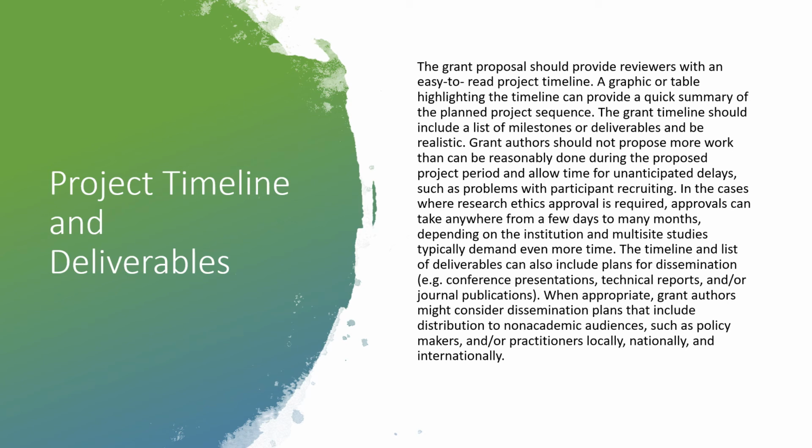Grant authors should not propose more work than can be reasonably done during the proposed project period, and allow time for unanticipated delays, such as problems with participant recruiting. One of the things that people don't often think about is that sometimes people don't want to participate in research, and so finding and recruiting participants can be a challenge, especially if your research involves a lot of time and no compensation.